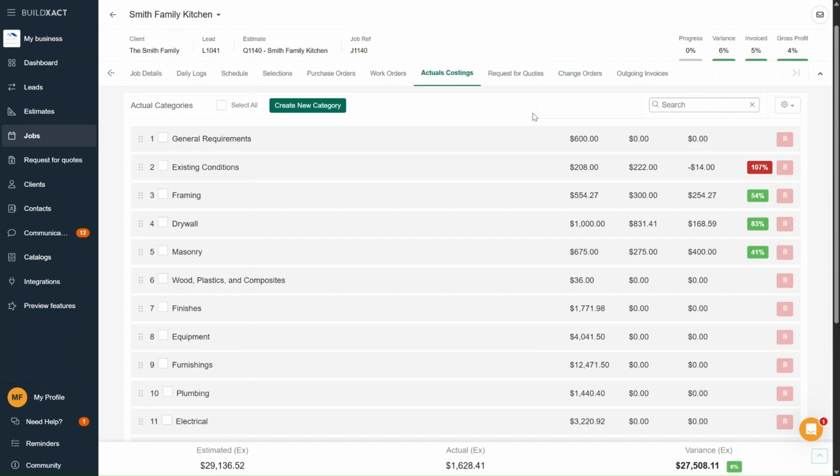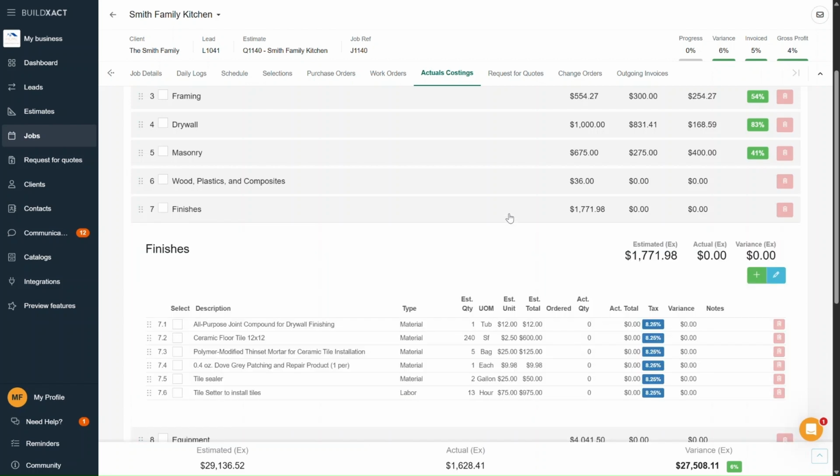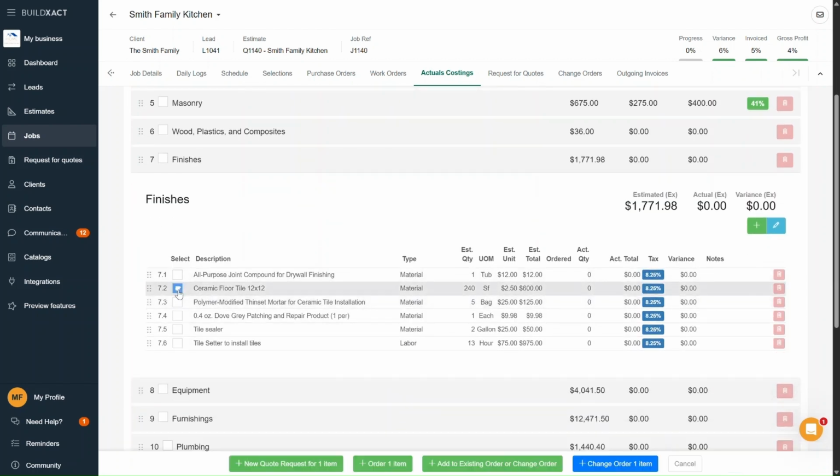If you've watched some of our other videos, you've probably heard me say that if you are working on something you originally estimated for, meaning it is listed in your actual costings, that's where you'll start the process of creating a change order. You'll select that line item or items and create the order here. This is how BuildExact knows to connect everything correctly and lets you see the comparison between what you estimated versus what it actually cost. It's basically your way of saying, hey, this change is linked to this specific item.